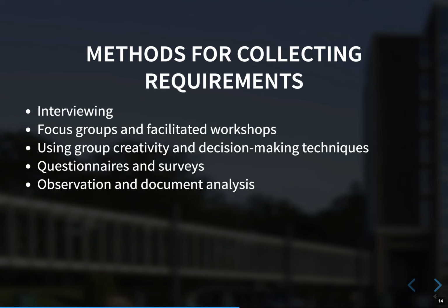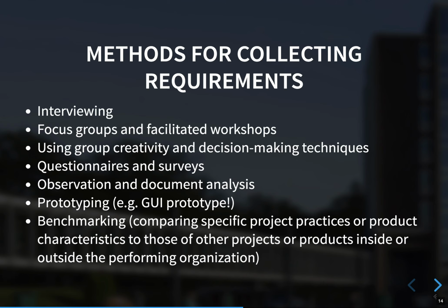Do observations and document analysis on all the documents you have. You can use prototyping, for example, a GUI prototype. Benchmarking: comparing specific project practices or characteristics with other projects or products inside or outside the performing organization.